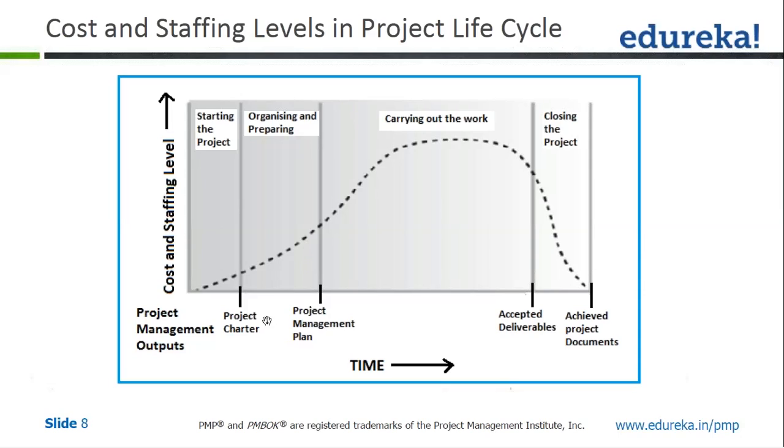As you can see, even to finish your project charter, you have to repeat your IPEC: initiation for the project charter, planning for the project charter, and execution wherein you will write the project charter. Actually the project charter is supposed to be written by the customer, but a lot of the time the buy-in happens if you yourself are writing it, and a lot of times in practice I have seen project managers writing the project charter, which is the right thing to do. So that is the execution part, wherein you collect all the items with respect to the project charter: what is the problem you are solving, what are the high-level constraints, the high-level requirements, the high-level risk, and so on. Then it will have the closing cycle, in which you will get the project charter as an output.